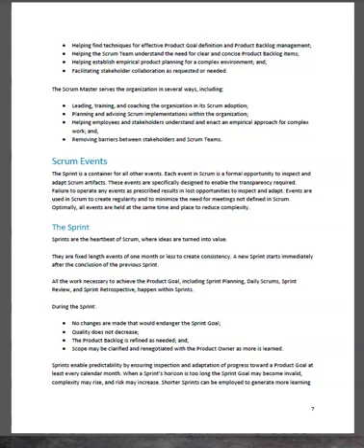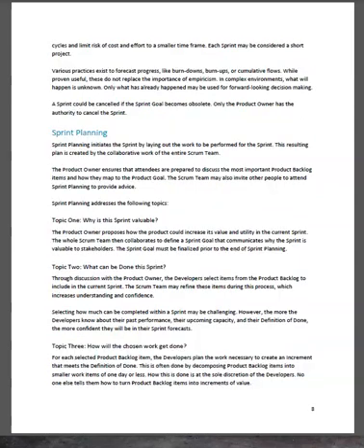When a sprint horizon is too long, the sprint goal may become invalid. Complexity may rise and risk may increase. Shorter sprints can be employed to generate more learning cycles and limit risk of cost and effort to a smaller time frame. Each sprint may be considered a short project.